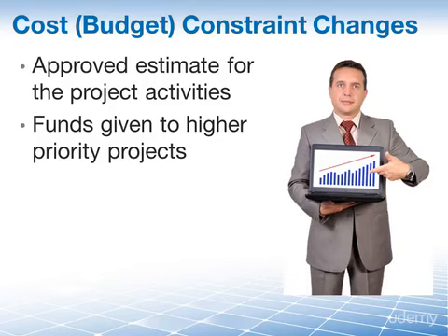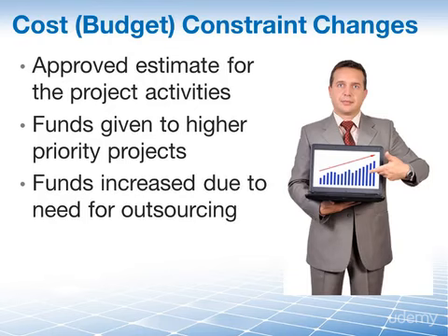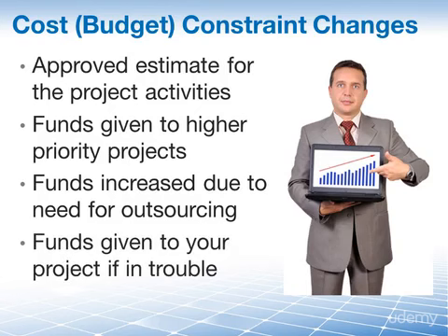The budget may also need to be increased if you lose key resources on your project and you decide that you need to outsource some of the work and bring in consultants at a higher rate to finish the project. In addition, if your project is running behind schedule, certain discretionary funds, such as contingency reserves or management reserves, may have to be funneled toward your project to help it complete successfully.